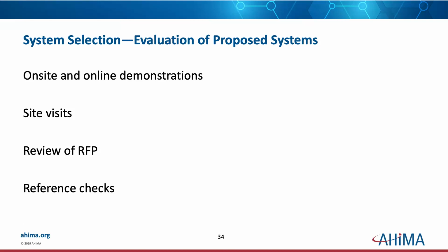And then, of course, you review the RFP, you tear it apart, you ask questions, you clarify information, you really try and pin your vendors down, and definitely do reference checks. Do reference checks. If they give you a list of 5 facilities that utilize their services or their products or what have you, call them, speak to the people that they have listed, ask them, what do you like about this? What do you not like about this?